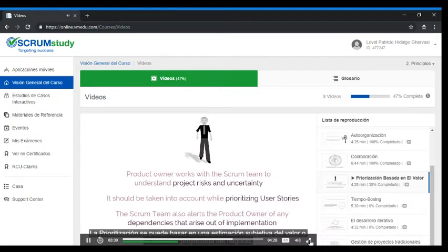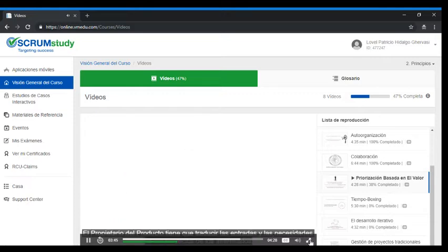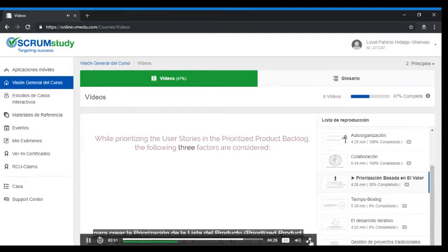Prioritization may be based on a subjective estimate of the projected business value or profitability, or it can be based on results and analysis of the market using tools including, but not limited to, customer interviews, surveys, and financial models and analytical techniques. The product owner has to translate the inputs and needs of the project stakeholders to create the prioritized product backlog.